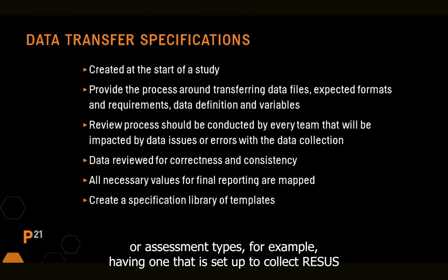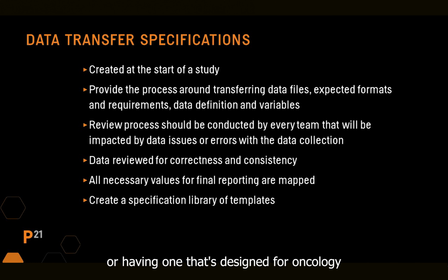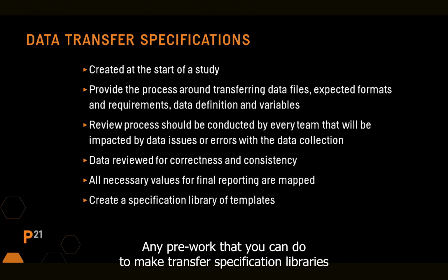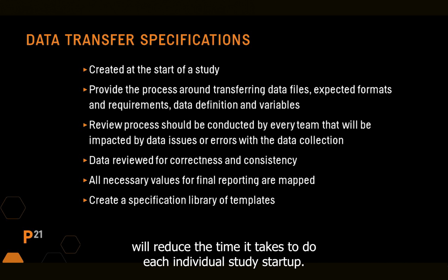For example, having one that is set up to collect RECIST data, or one set up to collect safety labs or imaging data, or one designed for oncology or the respiratory therapy areas. Any pre-work that you can do to make transfer specification libraries and templates, and have those pre-populated as correctly as possible ahead of time, will reduce the time it takes to do each individual study startup.